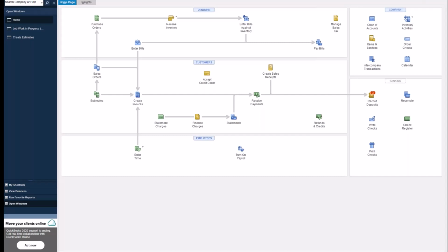We want those things to be in line, especially when we come into these larger contracts that can make a pretty big swing of things. So say we have 20% costs on something, we want to recognize 20% of the revenue. So this construction over under billings is one of the methods of calculating our revenue so that we can have a revenue matching.